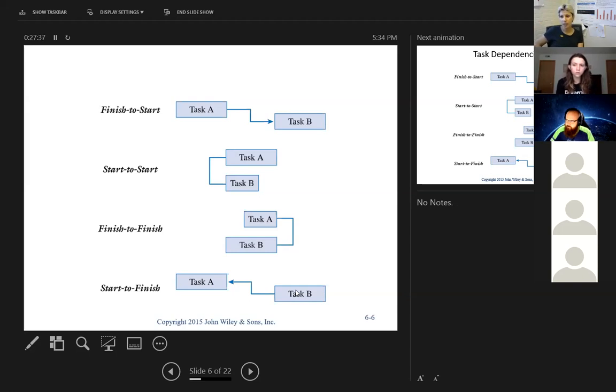These are some ideas I want to send you to breakout rooms with. I want you to think about finish to start. So in here, B depends on A. So the arrow points to the thing that depends on the other thing. So this B depending on A, this is codependence, and here A depends on B. Finishing A depends on starting B. Here, starting B depends on finishing A. Think about your life. Think about your cooking, breakfast preparation, doing things with your roommates, doing things with your sports team, or in other projects that you do in life, and give me examples of these dependencies.